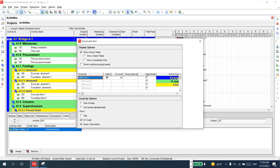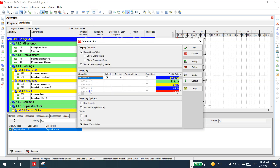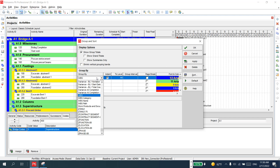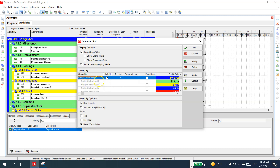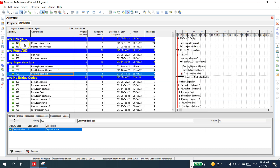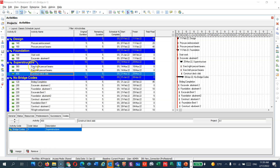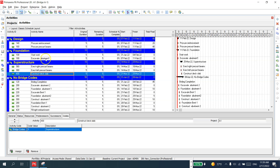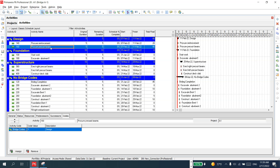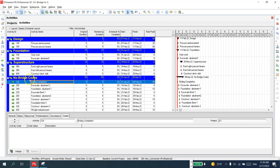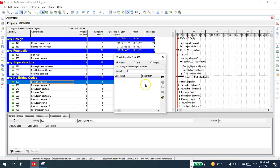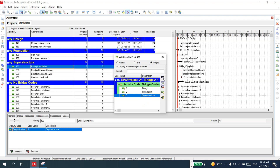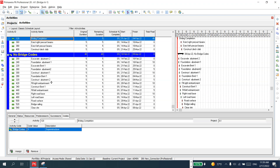Now I'd like to use Group and Sort. I'll choose my codes — Bridge Code — and apply at all levels. You can see I've organized my schedule by activity codes. This is a flexible way to ignore the WBS and filter your activities by the codes you like. For any activity without a code assigned, you can go to Bridge Completion, set it to the project, and assign Superstructure — and it moves to the correct group.